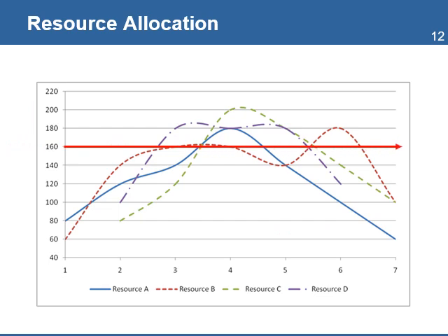The chart shows the time allocations of each team member over the life of a project. The lines go up and down, and you can see that for some team members, there are times where they have been assigned more work than they can do. Overallocation of resources is when you assign more work than can be done. When you assign less work than they can do, it is called underallocation of resources. This chart is useful to identify resource assignment discrepancies.